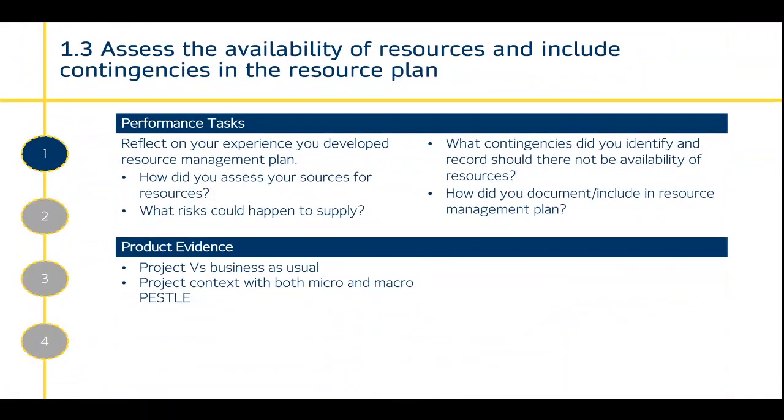1.3, assess the availability of resources, include contingencies in the resource plan. Likely there's going to be some changes, some difficulties, some wastage as the project develops, and because of that it's important to include some contingencies, so that is extra resources in case these issues do arise.